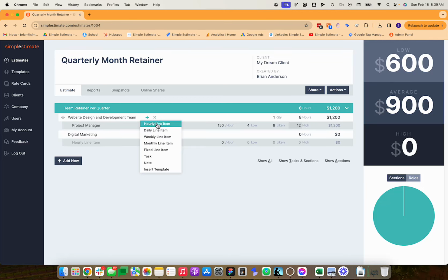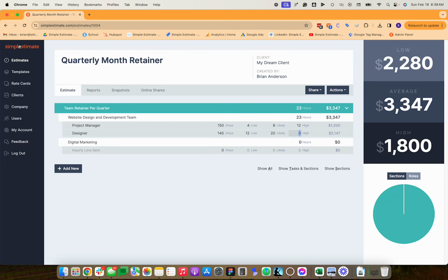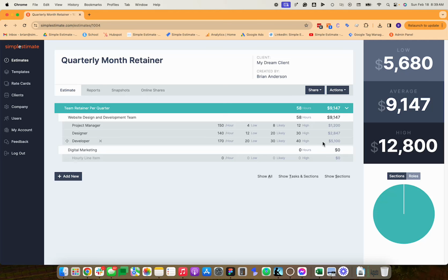Now I just need to come in here and create another hourly line item so I can add another person. We're going to need the designer. Let's say the designer is going to work slow weeks, maybe 12 to 20, sometimes it could be really busy. We'll do a 30-hour week. And another one here, we need a developer. The developer is going to work between 20 and 40, let's average in 30 hours a week. Okay, so we've got that team, and then we're going to add the social media specialist for digital marketing. And that person's going to work 4 to 8, sometimes 12 hours a week.